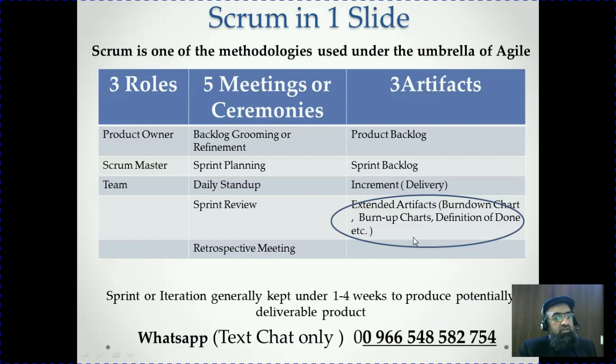Definition of done is just like your scope statement, acceptance criteria for the deliverables. Similarly here also, as a team we agree on these things, that when we say this thing is done, that will be the criteria to consider it as accepted. So we define different points, a checklist for the deliverables or the milestones, and that is called definition of done.